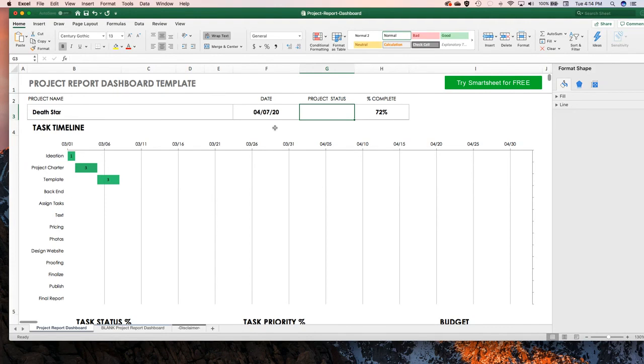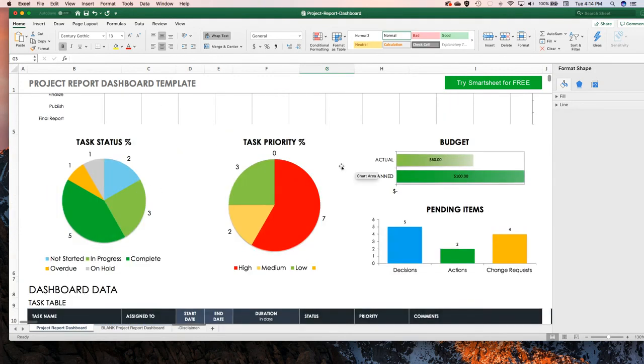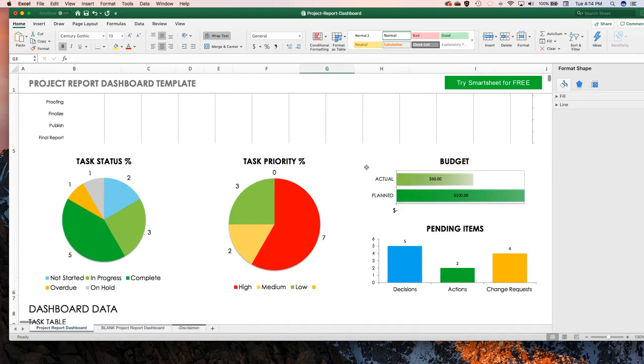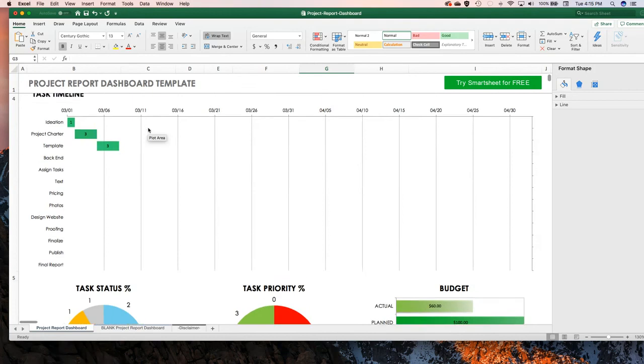You'll either say it's on time, it's ahead of schedule, or it's behind schedule. All right. And that will be based on this. If the percentage complete is higher than the amount that you've spent, then you're ahead of schedule. If it's below, then you're behind schedule. And if it's exactly on, then you'll say it's fine, that it's dead on. You got me? Yeah. All right.